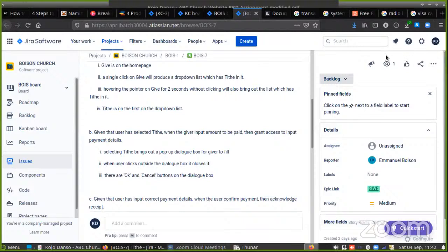You need to be led and guided by the stakeholder. If, as a stakeholder, I didn't tell you that in these transactions we can have this scenario happening, it can be scenario 1, scenario 2, scenario 3, 4, 5, etc. If this happens, this is what we will want to do. If I was silent about that, then you cannot just bring it in here. If during the elicitation of the requirement we talk about that, then that's fine. You can bring it over.